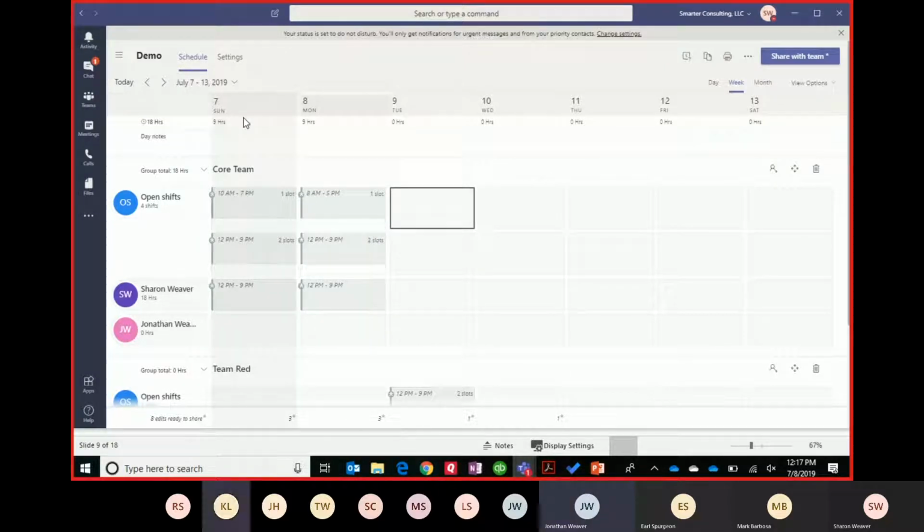there's this hours up here. It tallies the hours that are allocated to workers at the day level and then at the person level. So if you see right under our names, you can see the number of hours for that time period, or whatever you have it set up as, Sunday to Saturday or whatever you want, you can define that. But you can see I've got 18 hours scheduled under my name, and then 9 hours on those 2 days is what's assigned. And then there's more hours that are just available. Okay? They only show up in reporting once they've been assigned.